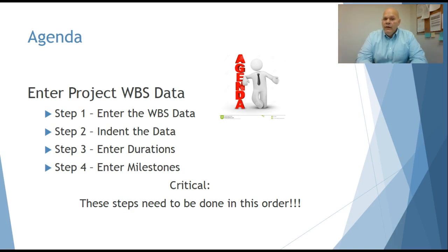First is entering the WBS data into the task column, indenting that data, adding durations for each of the tasks, and then entering milestones. It is critical that you follow these steps in this order and complete each step before moving on to the next step.